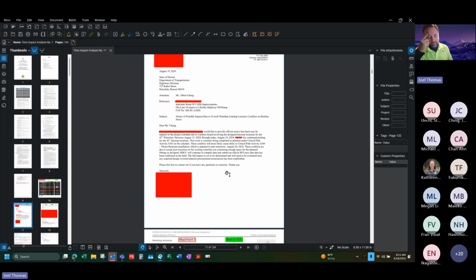And sorry, real quick on this too. If you're on projects and your contractor is in a meeting telling you guys, oh, we're being delayed, or we're about to experience a delay, just explain to them, hey, you have to get us proper documentation and show us on your schedule how this is occurring. It's not about trying to be sneaky and just being like, oh, they're not going to submit the documentation, they're not going to get the delay.